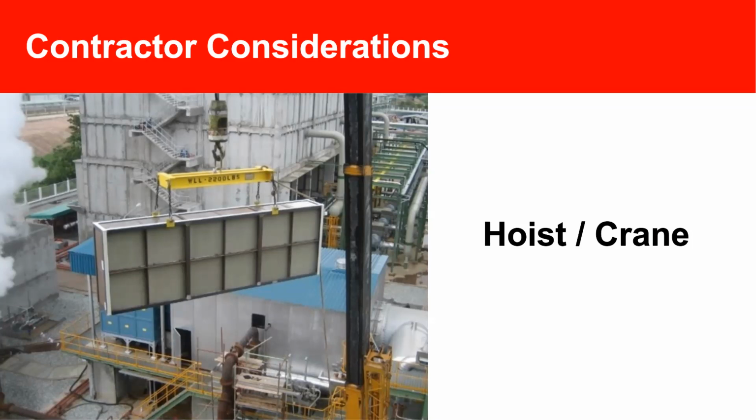The hoist and trolley systems have slower lifting and lowering speeds, but it doesn't mean that they have to be very far behind the mobile crane. The first thing that I recommend if you have a hoist and trolley system is optimizing your selection of the hoist and trolley. Even if you have one there, it might be wise, depending on your outage, to optimize that selection and change it out to a faster or more efficient system for your specific changeout. Some things to consider are headroom, the weight of the modules, and a couple other factors.